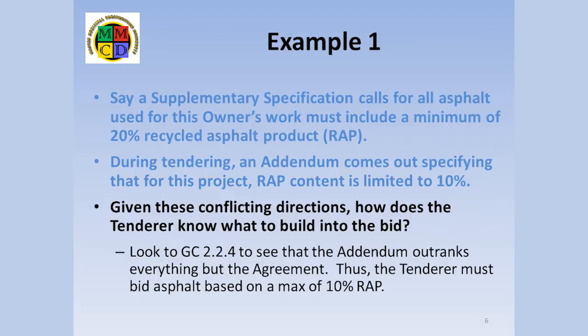Let's do another example of a simple application of the hierarchy. Say a supplementary specification requires that all asphalt used for this owner's work must include a minimum of 20% recycled asphalt product (RAP). During tendering, an addendum comes out specifying that for this project, RAP content is limited to 10%. Given these conflicting directions, how does the tenderer know what to build into the bid? We simply look to GC 2.2.4 to see that the addendum outranks everything but the agreement. Thus, the tenderer must bid asphalt based on a maximum of 10% RAP.